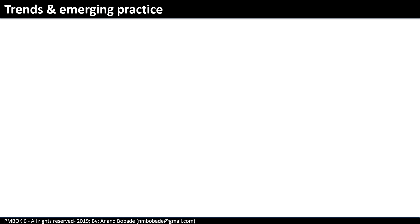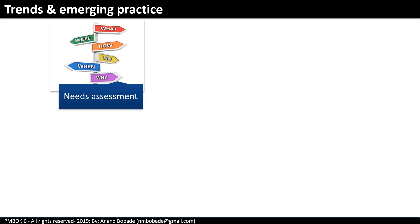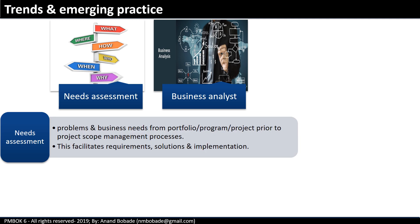What are the new trends and emerging practices in scope management? According to one report, 19% of projects fail — often because towards the end, the customer says this is not what they requested. This is where the concepts of needs assessment and business analysis help. Needs assessment is a pre-project activity done as part of program or portfolio planning. It helps in understanding the business problem, establishing the business need, and getting agreement with top management and key stakeholders.